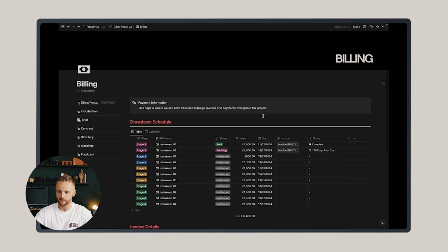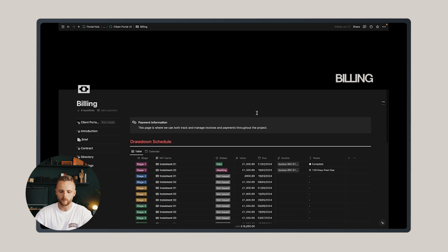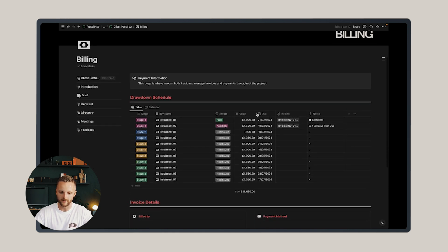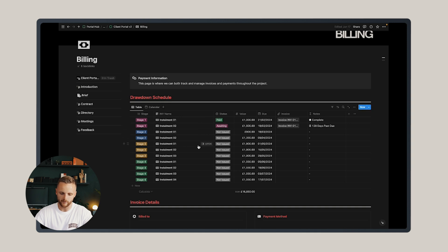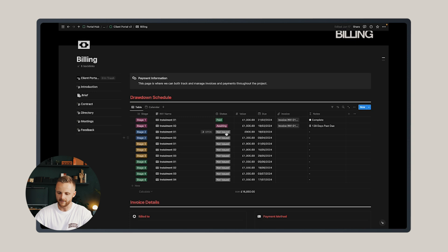The next page is the billing page, and I find it a very useful one. It has a drawdown schedule which I like to establish at the beginning of the project where I identify each work stage and the invoices associated with each work stage and then set out whether or not they've been paid or if they're awaiting payment or not yet issued and the dates in which I intend to issue them.